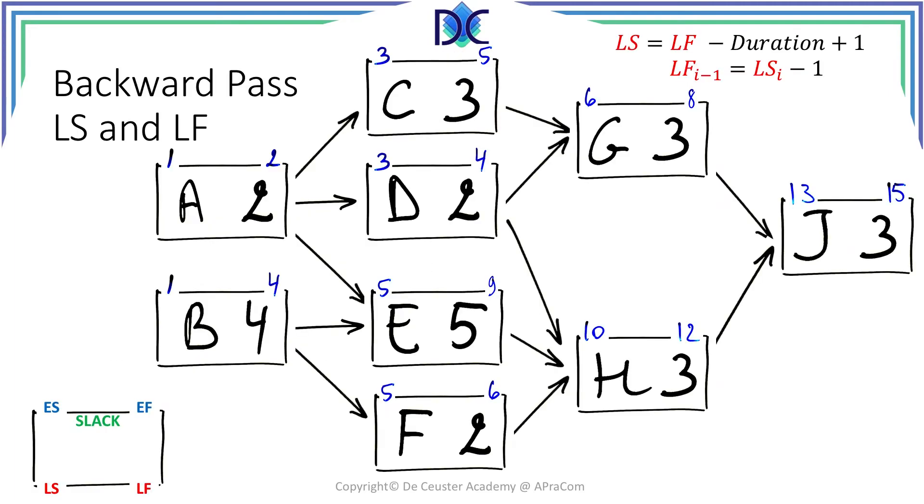Let's have a look at the backward pass. Here you see the precedence diagram with the early start and early finish information. On the left bottom you see again the legend related to the note. We are interested this time in the late start and the late finish. You will see them as red numbers under the activity notes.